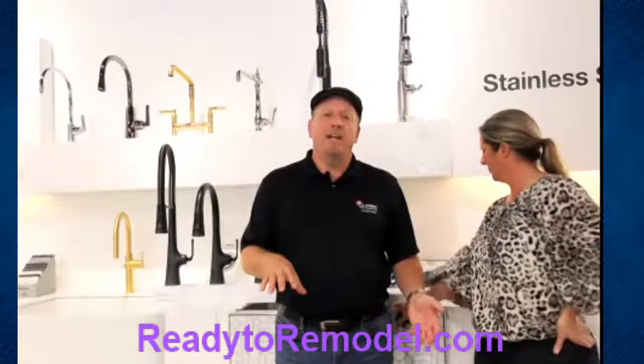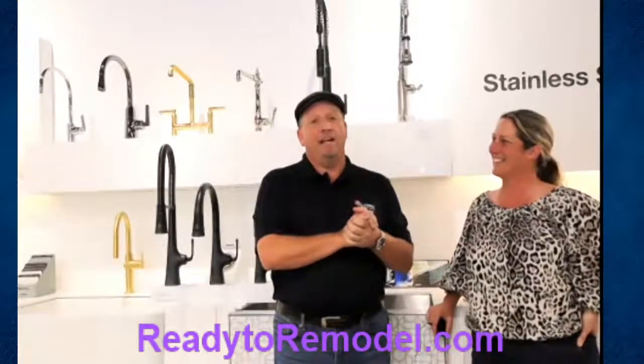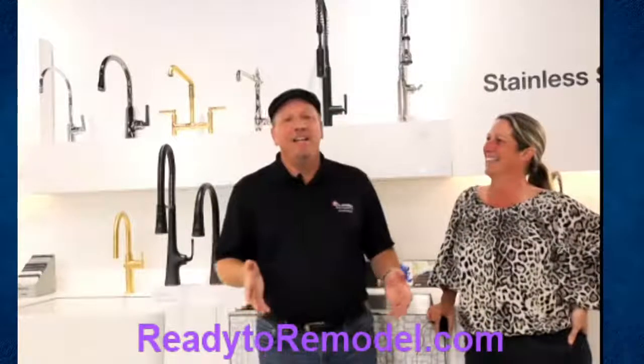But then when it's all done and as you're building it, your contractor can tell you how much things cost. And those estimates are meaningful, because if I tell you it costs that much and I'm your builder, I have to do it for that. So as you're designing, you've got full transparency into the cost, and before you start, you know how much things cost. So that would be your third option for the bigger projects for sure. Obviously I could talk about this for days, but very quickly, that's kind of the basics on those three types of contractors.